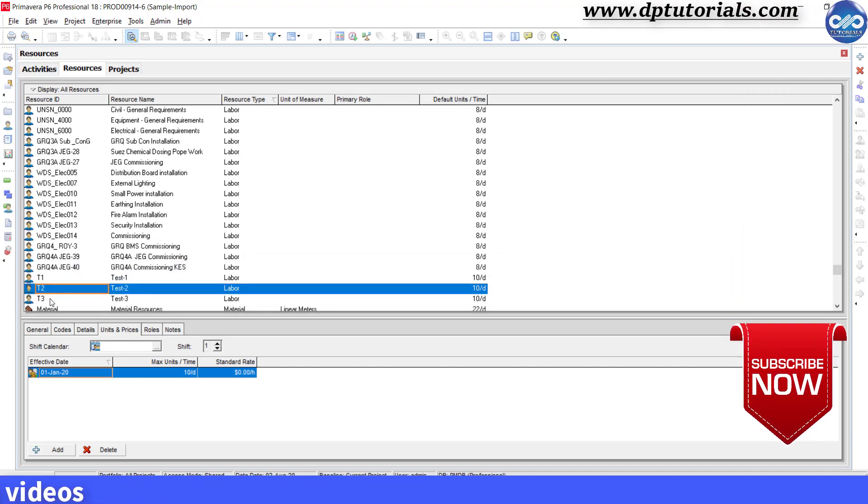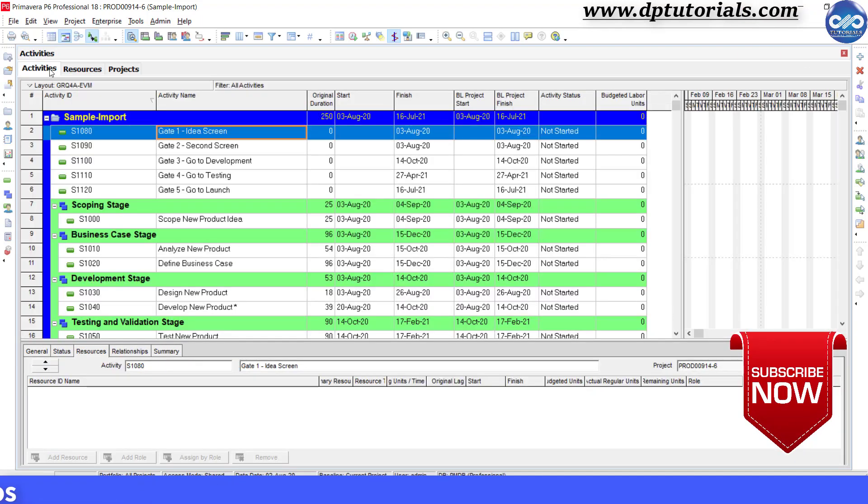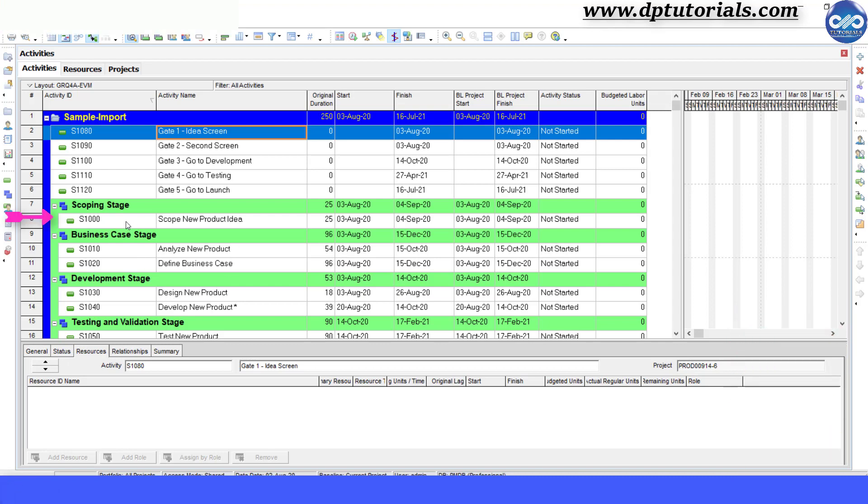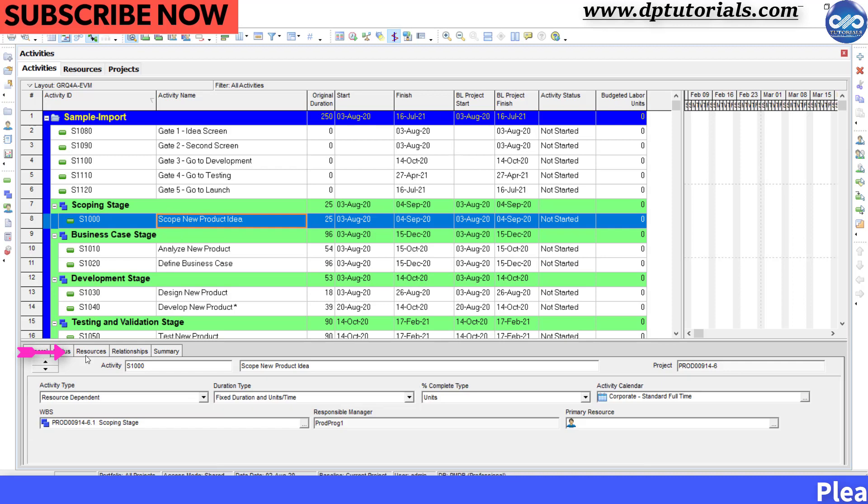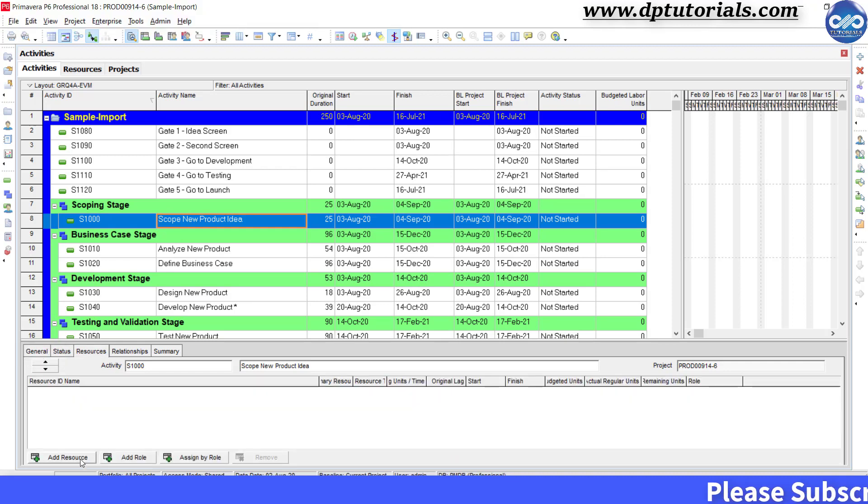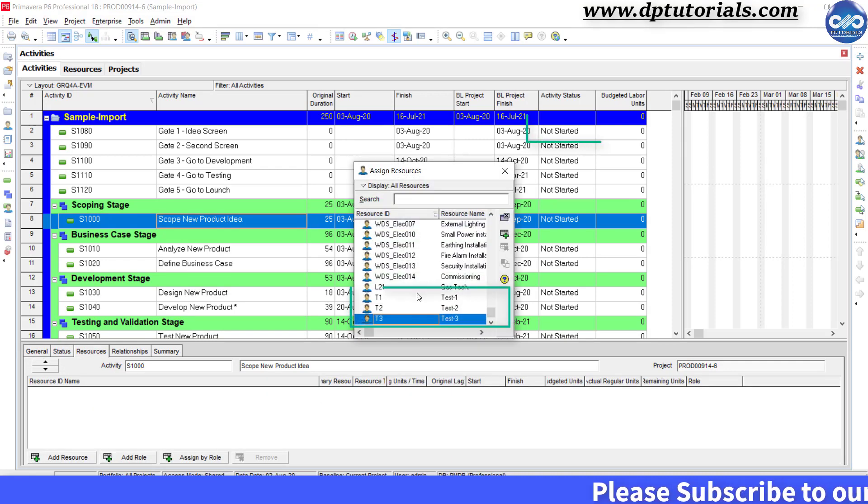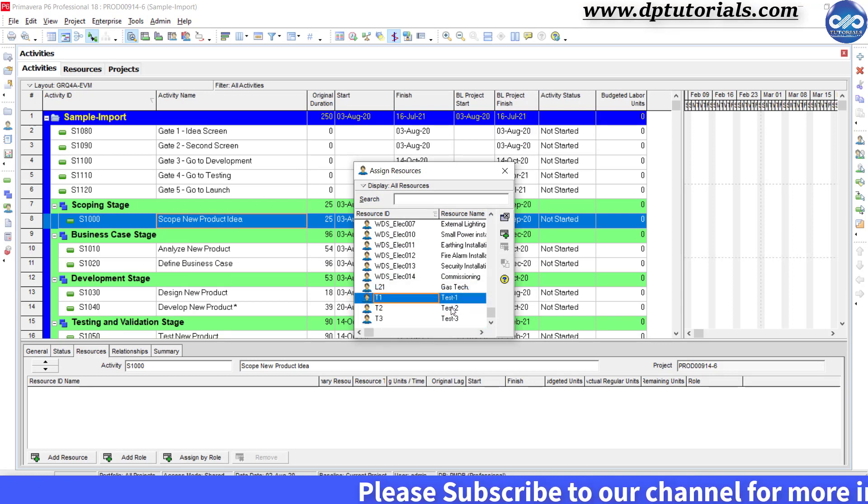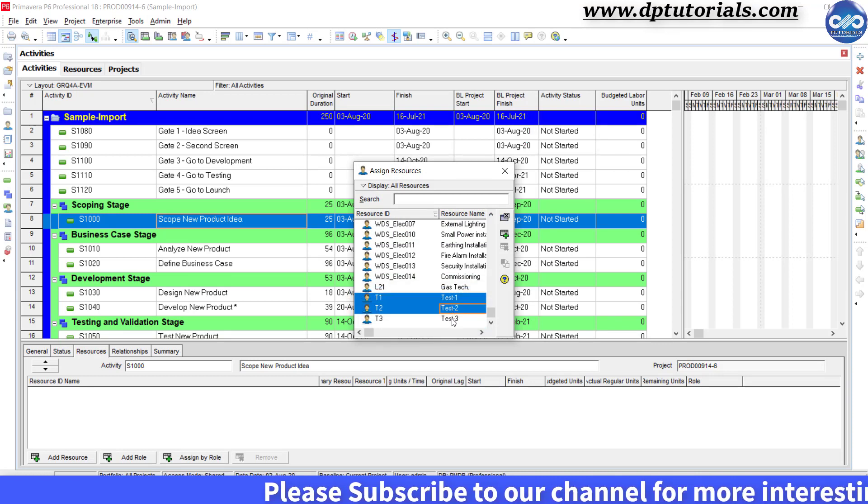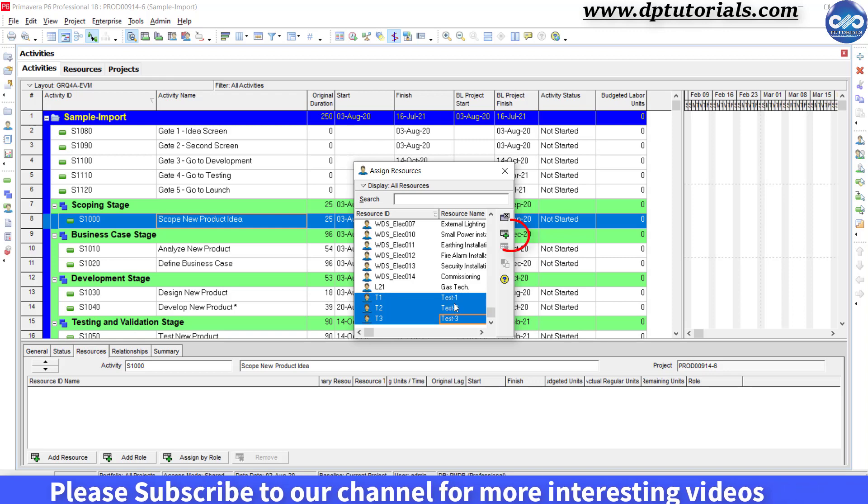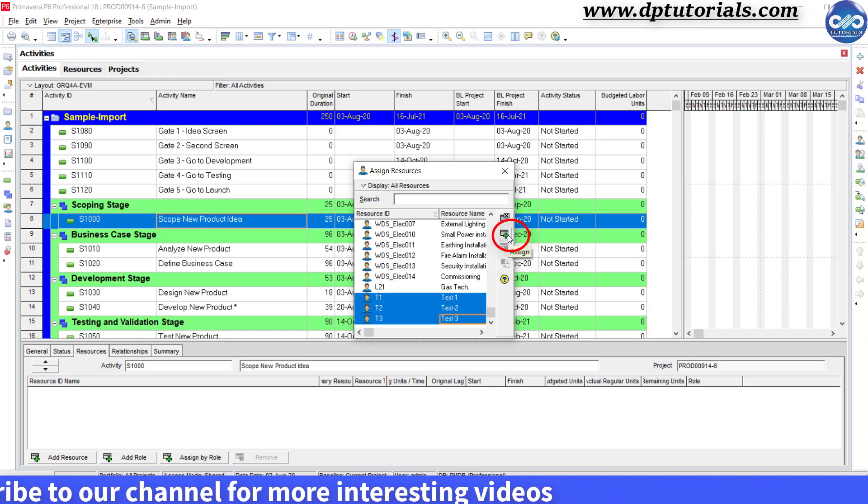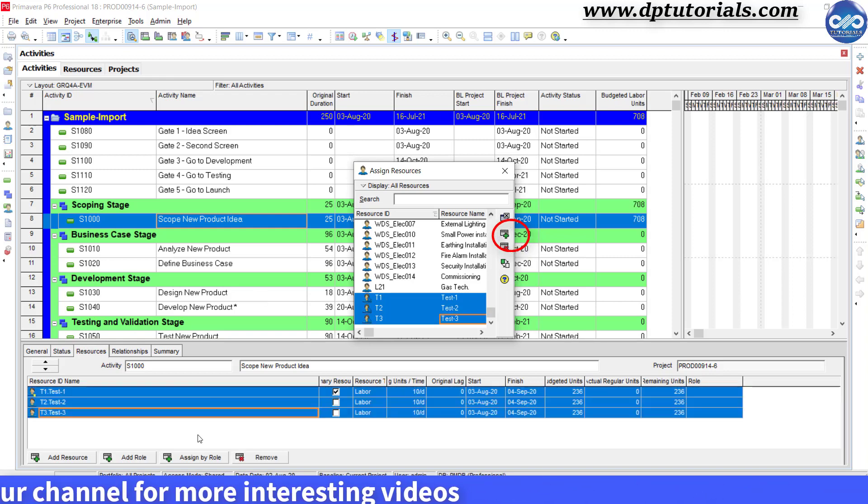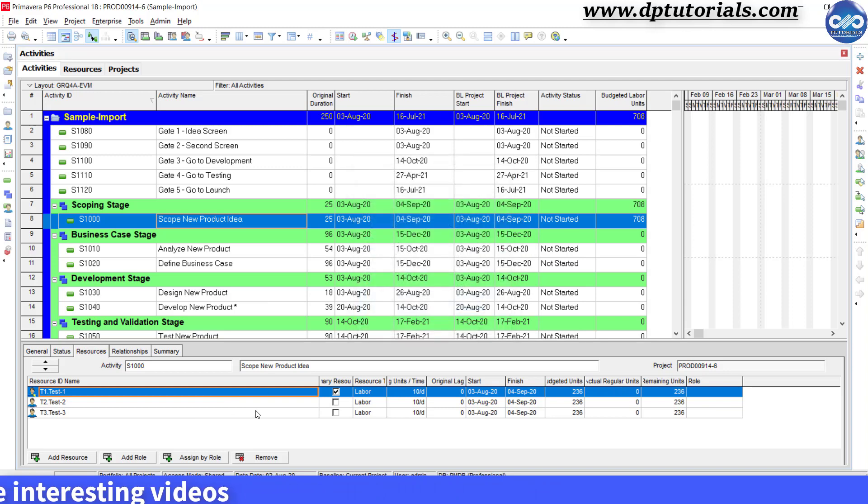Now, go to Activities window, select activity S1000 and go to Resources tab in the Details section in the bottom, click on Add Resource and select newly created 3 resources t1, t2, t3 for this particular activity. This is for the safer side to check the ids in the exported Excel. I will show you how to do this.